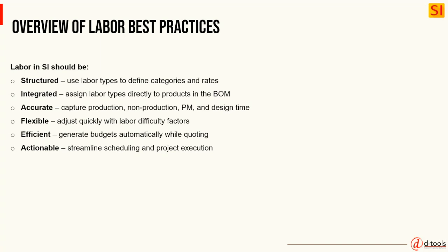Fourth, we know every project is different. That's where labor difficulty factors come in. You can scale up or down with a single setting instead of manually editing dozens of line items.